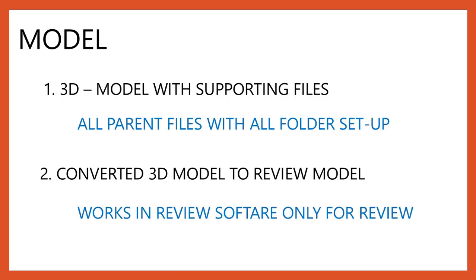Now let's go to the last deliverable, which is the model — a 3D model with all supporting files. There are two types of 3D models submitted. The first is the parent files with all folder structures, submitted to the client so they can open it in the same software used to build the models. The second type is a converted 3D review model, used only for review purposes where you can review pipings, structures, cable trays, and instrument drawings but cannot make any modifications.